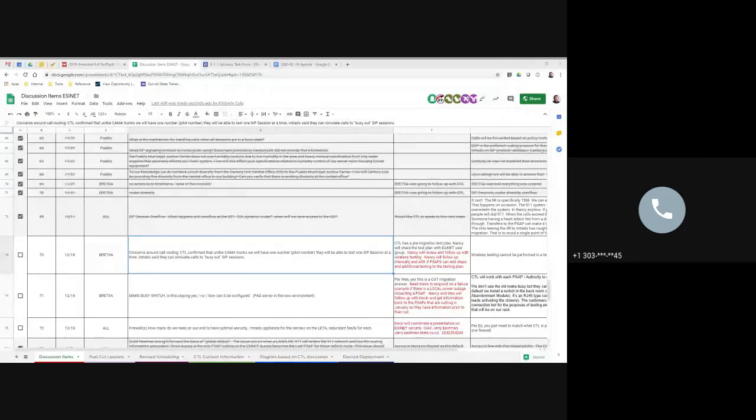One of the things I remember hearing about the 3-digit star code, at least for Bretza, was that it wasn't tested from a dispatch position during the pre-test. We tested it from a dispatch position, but I think we tested it doing more of a flash transfer and not hitting the short code buttons that were pre-programmed.